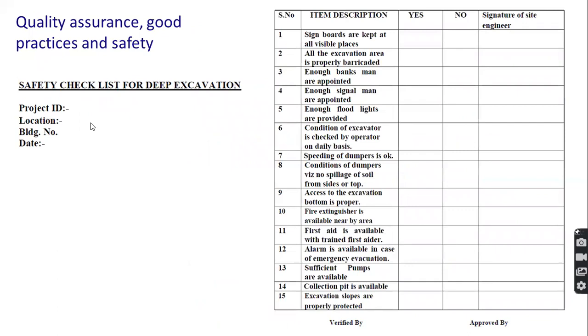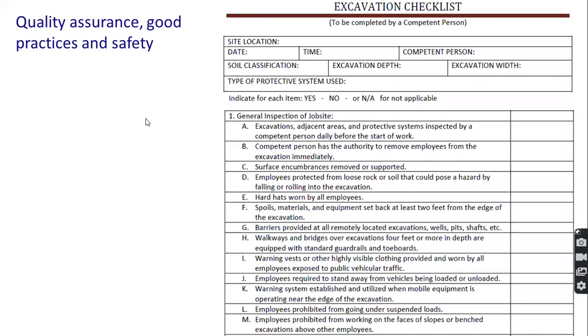Then some safety checklists for deep excavations. This is a general safety checklist. See whether these are in place, and the signature of the engineer has to be taken before the start of the work on each day. And a more detailed excavation checklist is shown here, and you can see that the activities are categorized into, say, general